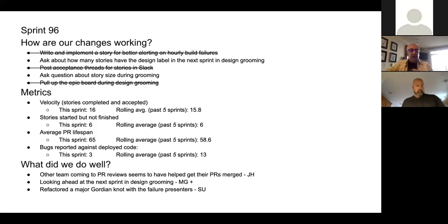So at the beginning of the meeting, no things will have the strike through, and as the team discusses each one, they'll say, do we need to continue talking about this, or is it cool? If it's cool, they strike through. It won't show up in this paragraph at the next sprint. But the things that are not strike throughs, those will show up next time.